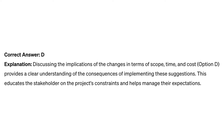Correct answer: D. Discussing the implications of the changes in terms of scope, time, and cost provides a clear understanding of the consequences of implementing these suggestions. This educates the stakeholder on the project's constraints and helps manage their expectations.